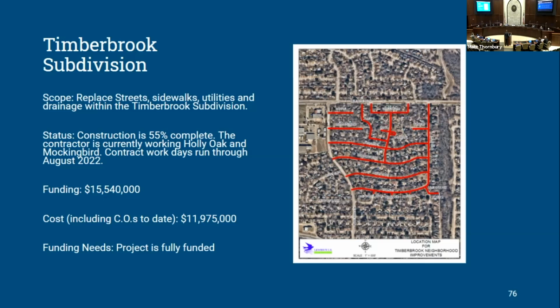We're holding the contractor on this project to working on 2 streets at a time. Some of the problems we've had on this project on the construction side were created by allowing the contractor to work on more streets at the beginning of the project than they were really capable of doing, and we didn't understand that until they got into it. So at this point, we're keeping them from being on more than 2 streets, and it seems to be working much smoother.